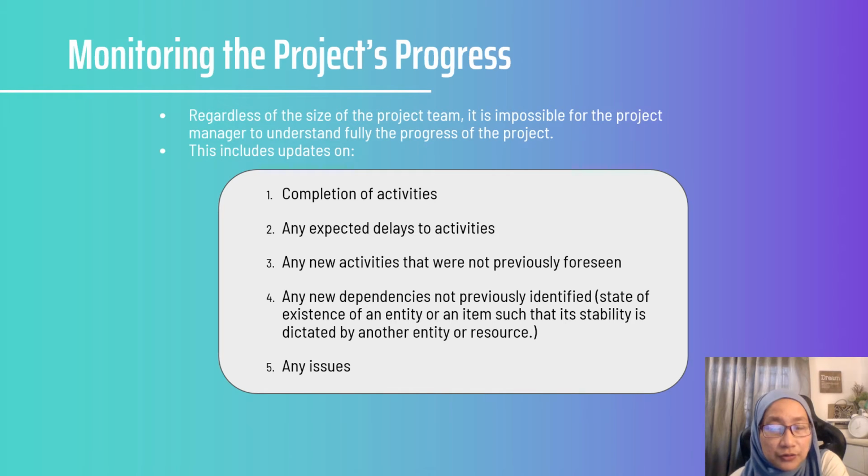So this includes updates on the completion of activities, any unexpected delays to activities, any new activities that were not previously foreseen, any new dependency not previously identified, and any issues. This one I will prepare a template for you, for the progress check in week 8 and week 11.